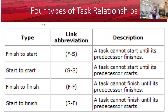In diagramming techniques used in project management software applications, we use what we call activity on node. There are four types of task relationships: finish to start, start to start, finish to finish, and start to finish. The first three are very common in project schedule management; the last one, not so much. A lead time is most useful when you have a finish-to-start relationship and you'd like to accelerate the start of the successor activity. A lag time can be used in all sorts of relationships — it is a waiting time between two activities that have a task relationship.